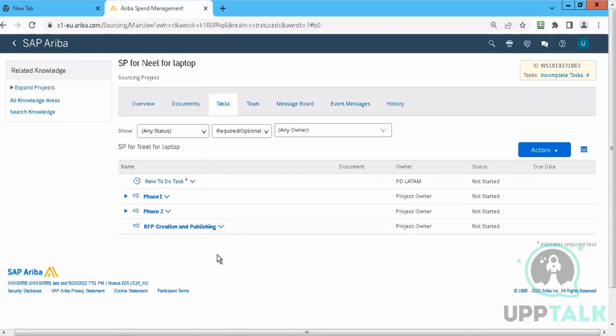You can map this process by creating phases and tasks. Generally the process is defined by the company and you map it at the template level. You define the process so that the end users will follow it. At the template level you design it, and then the end user who is creating the project follows it. As you can see, it all came in here, right?